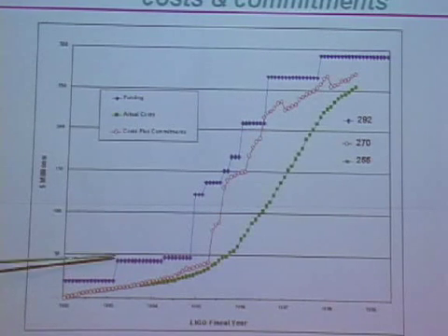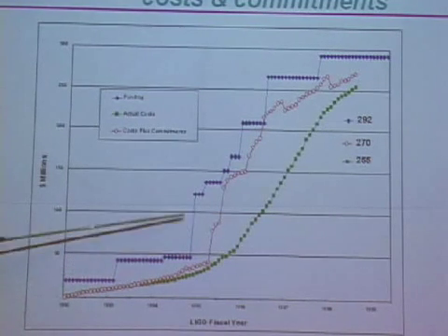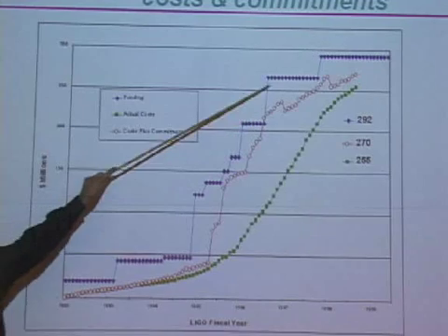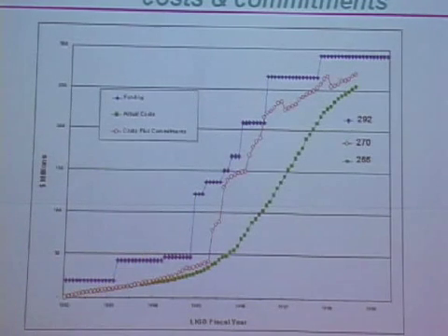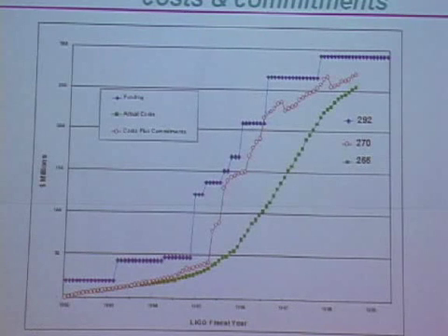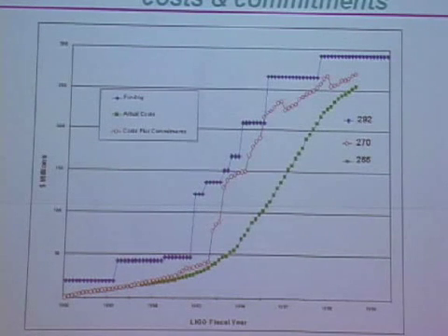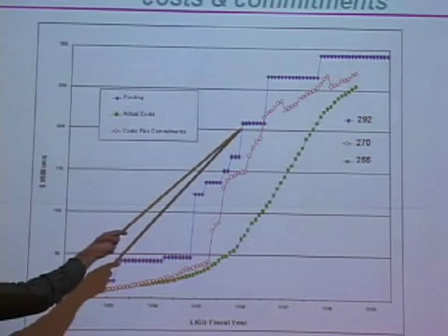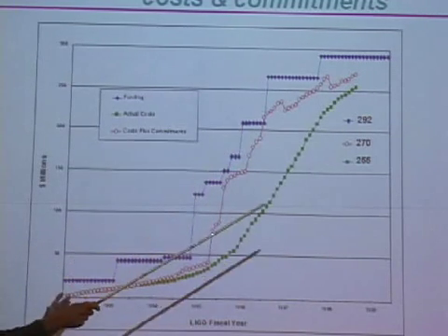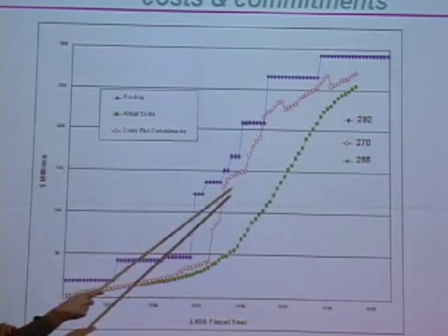This graph here is when we got the funding. The funding should always be to the left of what you spend, or you've spent in advance. In our case, we are very fortunate that the funding always preceded the need. Sometimes it doesn't, and then you have to slow things down and wait for funding, or borrow or something.